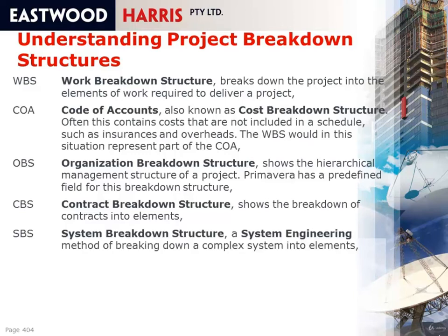System breakdown structure comes from system engineering. That breaks a project down into its systems. So if you've got a process plant, a system might be the potable water, high pressure air, and each individual process would have a system identification.